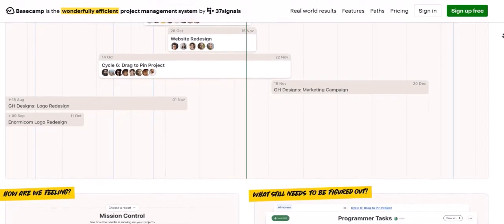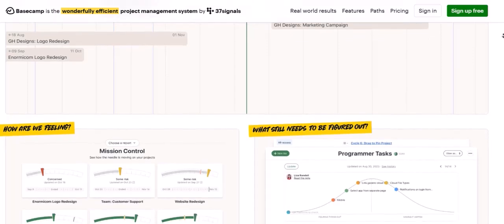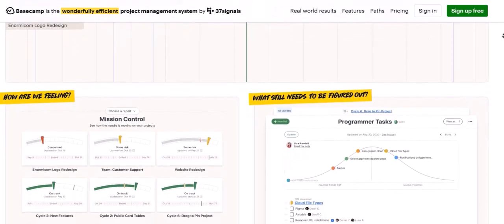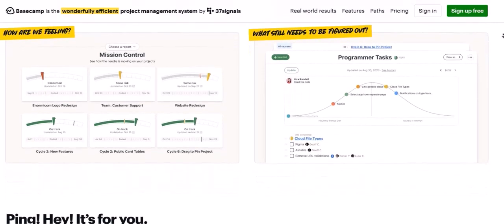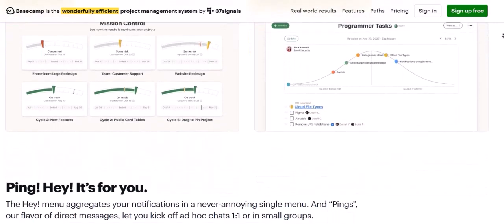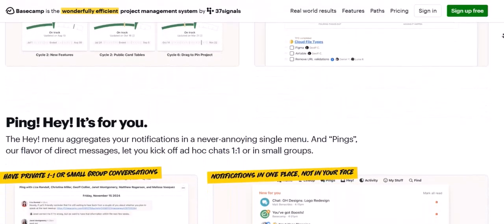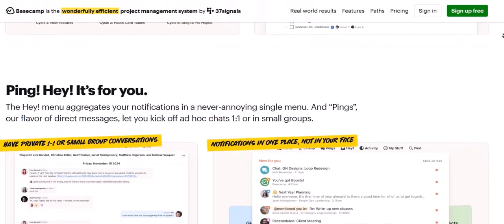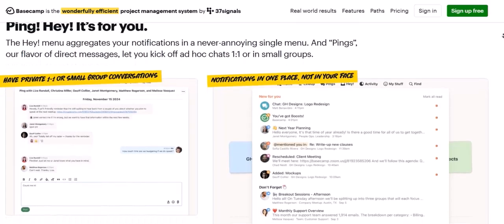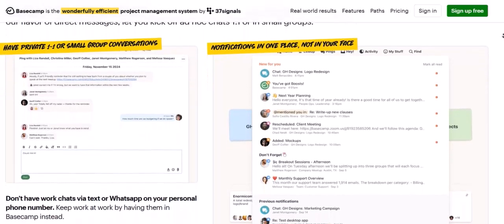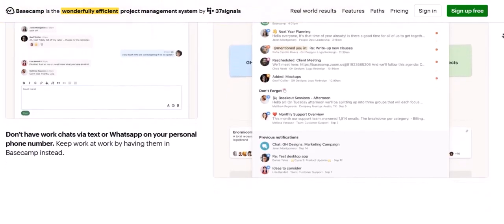File naming conventions. Establishing clear and consistent file naming conventions is crucial for easy identification and retrieval. Include relevant information in the file name, such as the document type, version number, and date, e.g., project_plan_V3_20250414.docs. Descriptions. Adding detailed descriptions to your files provides context and helps team members understand the purpose and content of the document without having to open it.